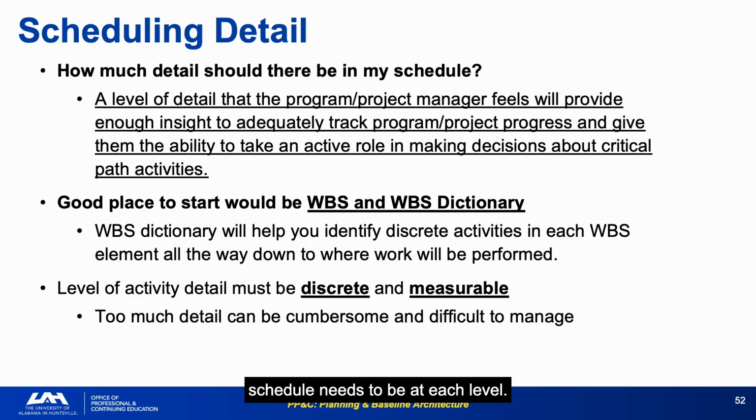Level of detail must be discrete and measurable is the performance measurement requirement. An activity that cannot be objectively measured as complete or incomplete cannot support EVM. It produces subjective percent complete estimates. Rolling wave planning is the practical solution. Plan the near-term work in detail and use planning packages for work that's far enough out that the definition is not complete. Convert planning packages to work packages as you get within 6 months of the work.